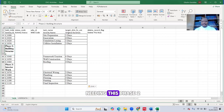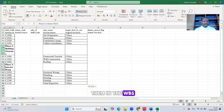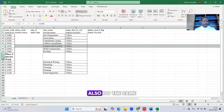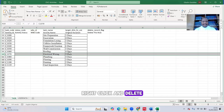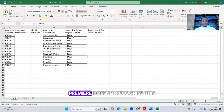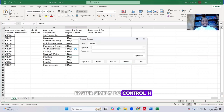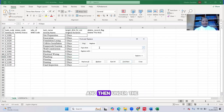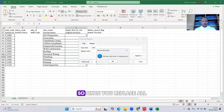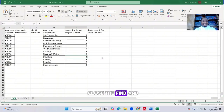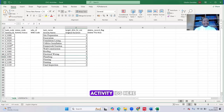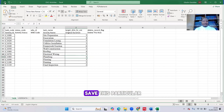We don't need the Phase 2 and Phase 3 rows since we've already created them in the WBS, so right-click and delete those rows. Also, Primavera doesn't recognize 'days' as written, so we delete the word 'days' using Ctrl-H. Under Find, type 'days'; under Replace With, leave it blank. Click Replace All, then OK and close. Now we're left with only the numbers. We have Activity IDs, Activity Names, and Durations — save and close the spreadsheet.